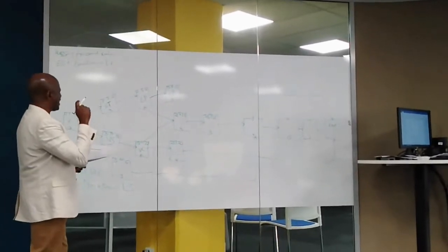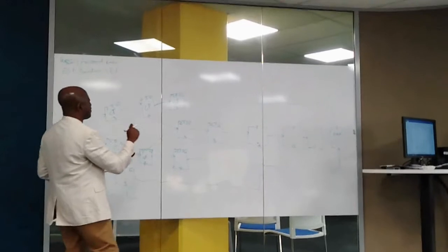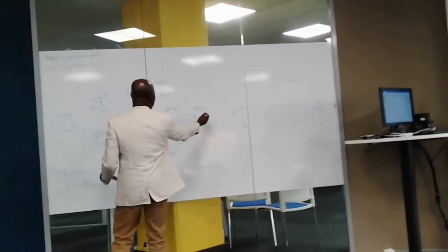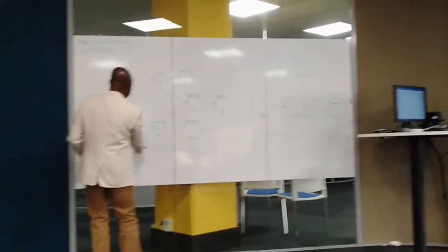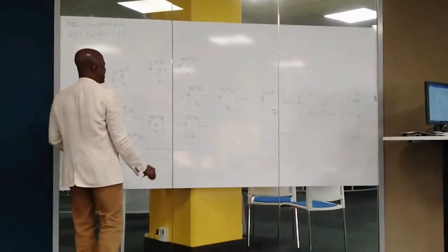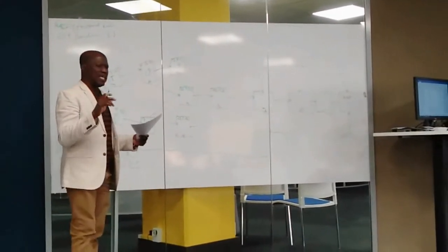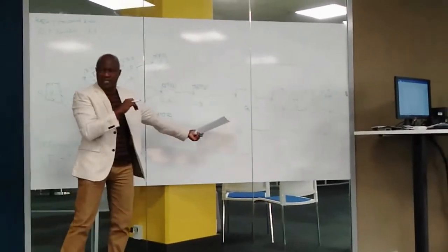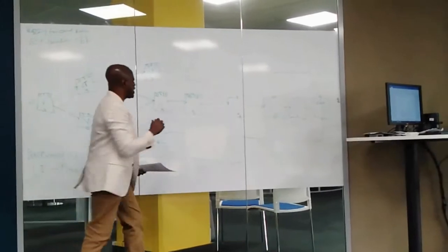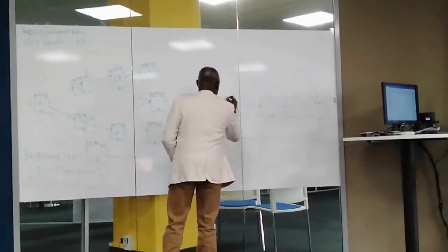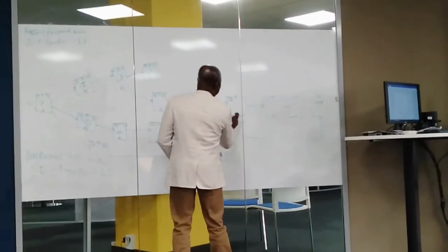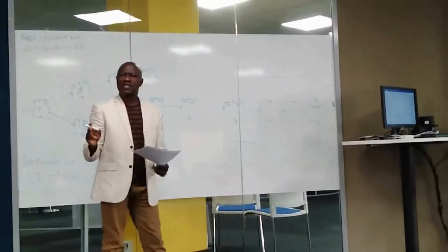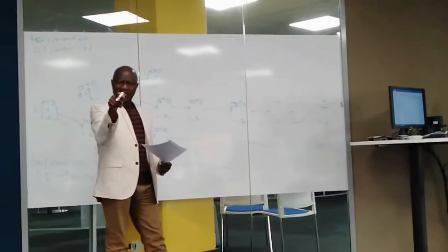Now, look at activity 11. It is dependent on activity 9 and 10. Look at activity 9, it has 28 days. Activity 10 has 6 days. And we said the rule says we take the highest number when you have 2 activities preceding another activity. So we take 28 here, and we add these 3 to it, making it 31 days. Are we making sense? Yes. That's why you cannot have 66 days just calculating like that.